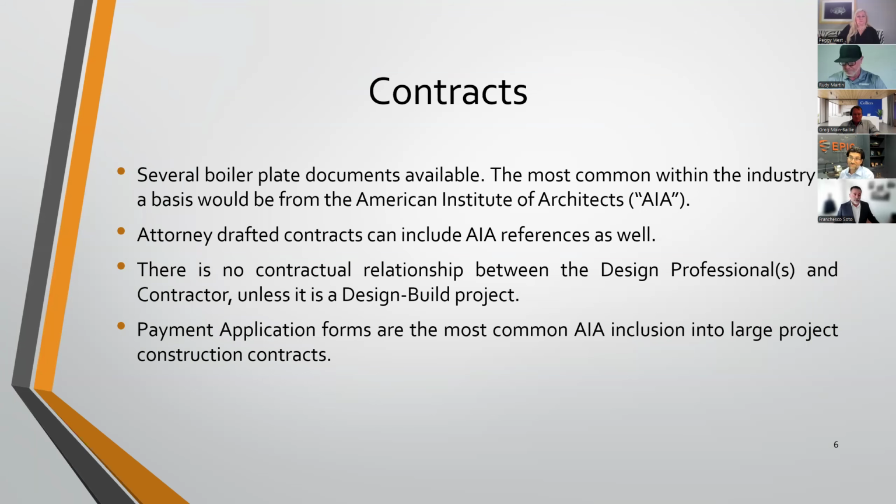Delays. Of course, no construction project is ever delayed, right? So they all start and stop at the exact time. To me, that's probably one of the more critical ones: how are you going to deal with the inevitable delays that occur in any construction project? Are you going to have a delay damage clause? Are you going to have a provision for how to deal with unexpected circumstances? Think back to when COVID hit. How were those contracts prepared to address those types of unexpected circumstances, which shouldn't be unexpected because there's something going to happen in every project that's going to delay it.